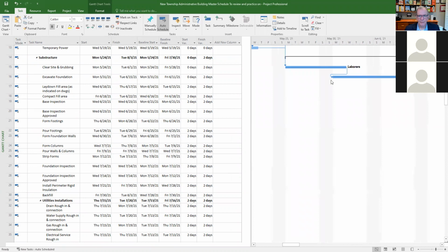Yeah, because they overlapped. That's why. So that's not showing anything. Oh, you know why that went like this? You see how that went like that? Well, because I already said this was done. So it extended this. Also, the other thing you should know is when you update, update from earlier activities to later activities. Don't update from later activities backwards, because this is locked in place on those dates. Once I say it was done on those dates, it's locked there.